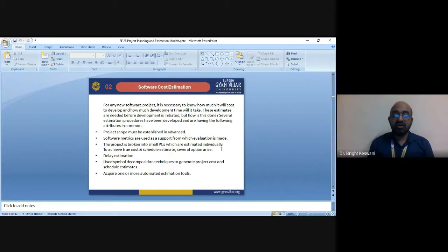Senior staff heavily involved in early activities is generally more expensive than junior staff involved in later design tasks, code generation, and early testing. So, cost and effort for each function and software process activity are computed as the last step of process-based estimation. If the results of the decomposition technique show little satisfaction, further investigation and analysis must be conducted for the successful implementation of process-based estimation.